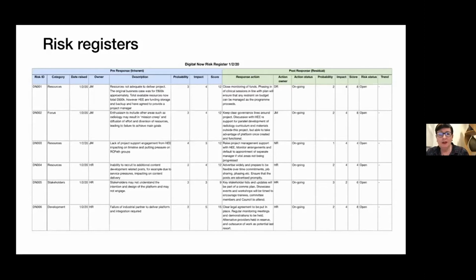So if you're reliant, on this last risk on the page, failure of a partner to deliver something is something that you can put contracts in, you can watch them like a hawk. But when you're building a house and the builder goes bust, you can't control that. You can try and do your due diligence to make sure the builder's been working locally and is well known and you've got references. But that's something that you can mitigate against through those references, but you can't prevent it.